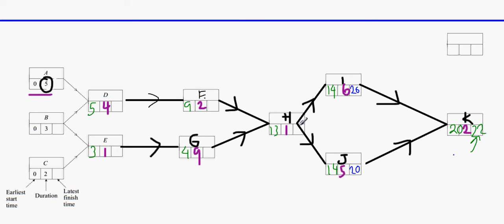H goes into both I and J, so we subtract: twenty minus six is fourteen, twenty minus five is fifteen. This time we write the smallest number, which is fourteen. Fourteen minus one is thirteen, so we write that. Thirteen minus two is eleven, thirteen minus nine is four. Then eleven minus four is seven. Four minus one is three — since we keep the smallest number, we write three. That completes the latest finish time algorithm.